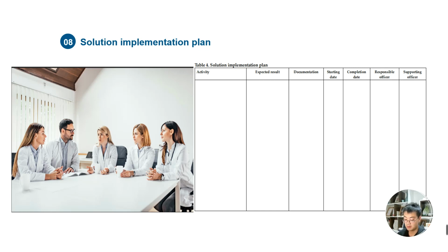Specify how each activity will be recorded, like meetings in the form of minutes, records of decisions taken, and arrangements for follow-up activities.